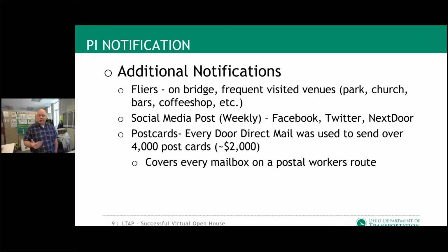Social media posts. We also posted on a weekly basis. And every single time we made a post, we noticed a surge in participants on the website itself. So it just goes to show that you just can't do one notification and be done with it. You need to do multiple notifications. And we did one notification every week until the very last day. And we still have participants on the last day because of that outreach.